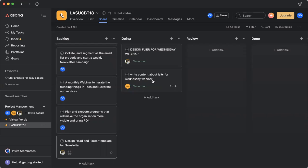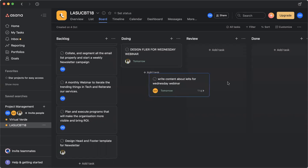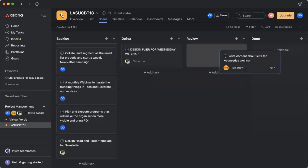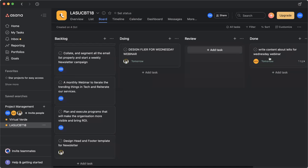And after Ella is done with this task and needs the assigner, the person that assigned the task, when she needs the person to review it, then she moves this board to review. Then, whosoever created the task or assigned the task, or the person she's reporting to, will come here and review it. After the person has reviewed appropriately, then it can be moved to done.